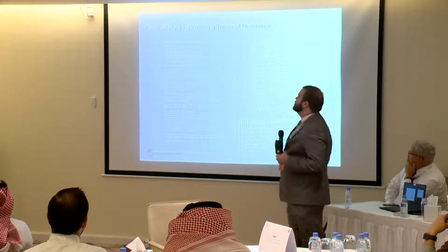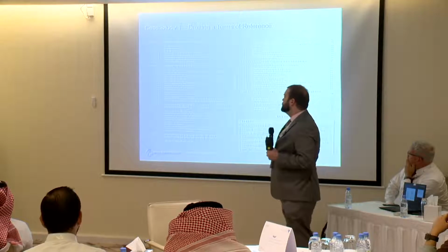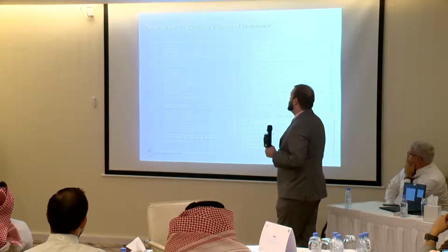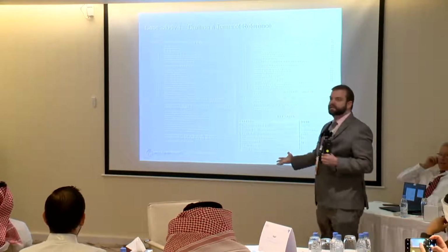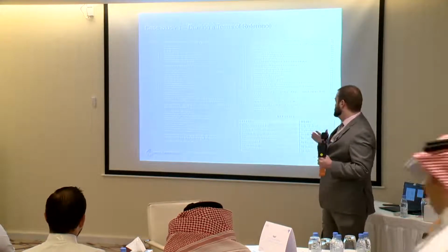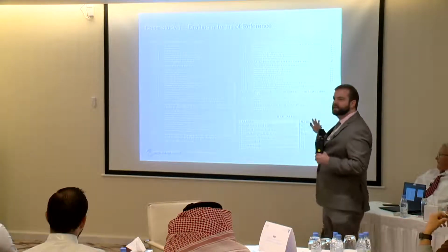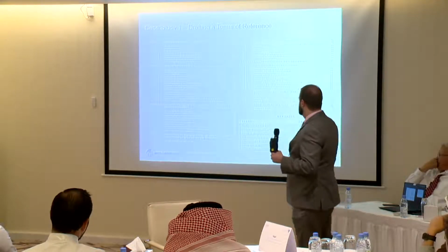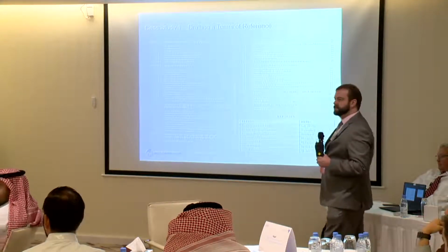This next one is from an RFP from the Virginia P3 program when they were sending out an RFP to receive proposals. Again, it's slightly different. The one thing they included here is key dates. You can see the issue date of when this RFP is sent out, when the technical proposal is due, and when the financial proposal is due. They uniquely divided those into two different documents. Then there's the selection process, and when the project was to reach commercial closure and financial closure, including start of construction.